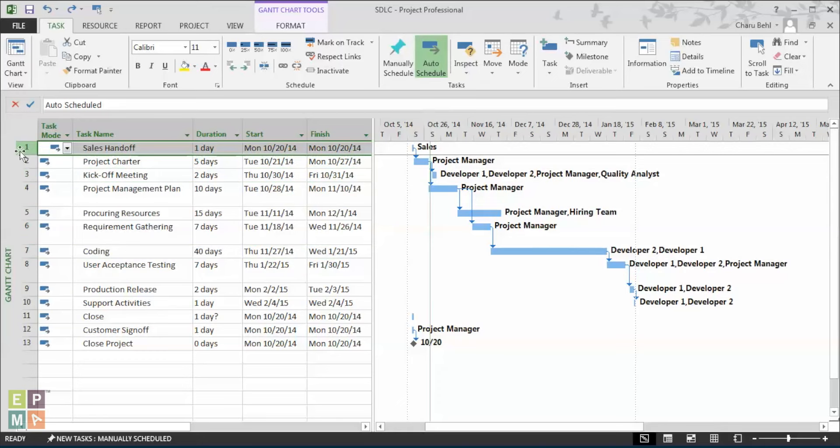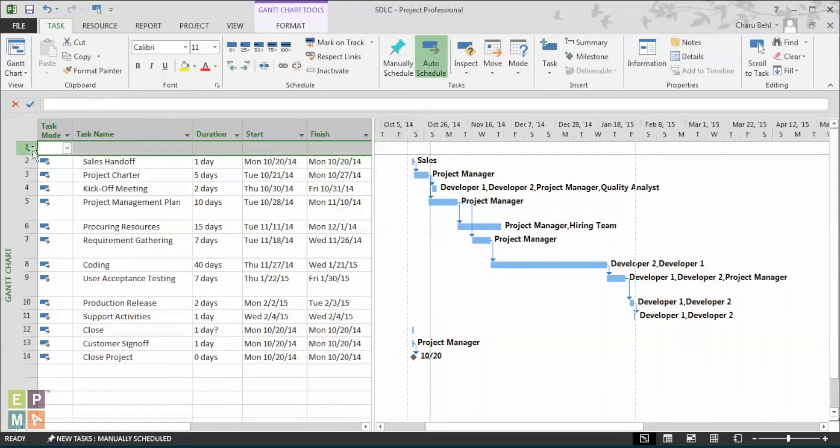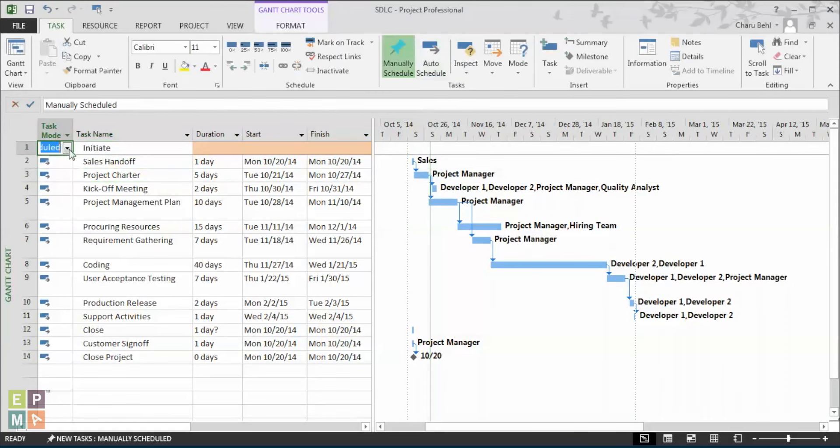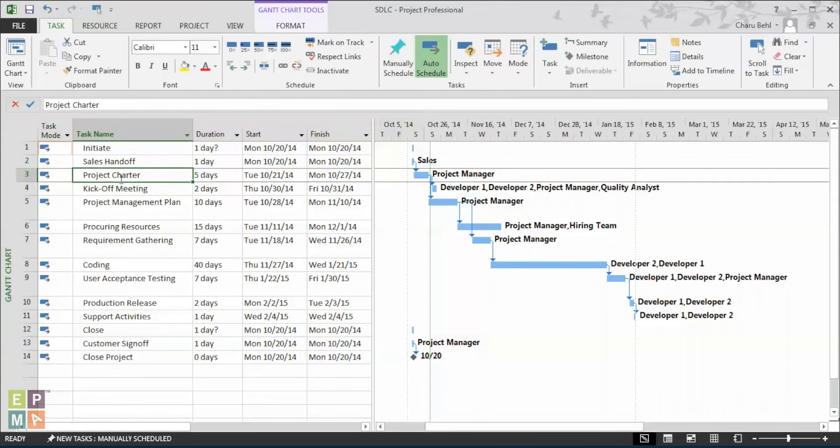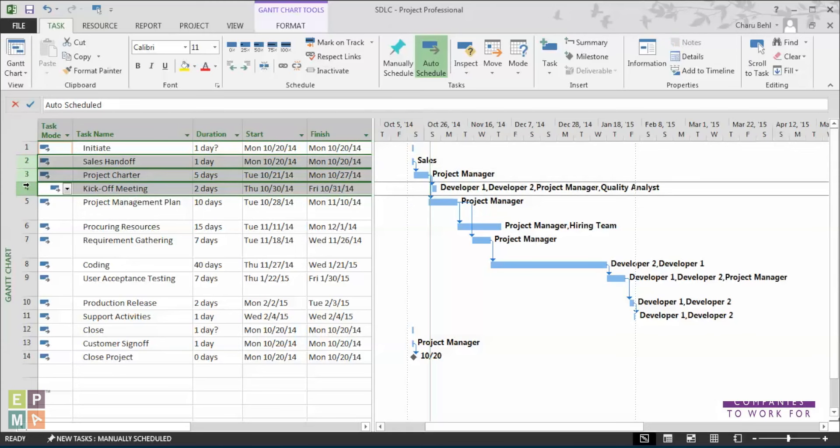The first method to insert a summary task is to insert a normal task and give it a name. After that, you will select all the tasks that need to be the sub-tasks under the initiate phase.